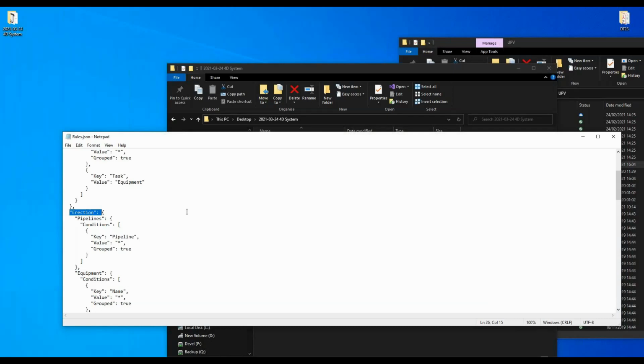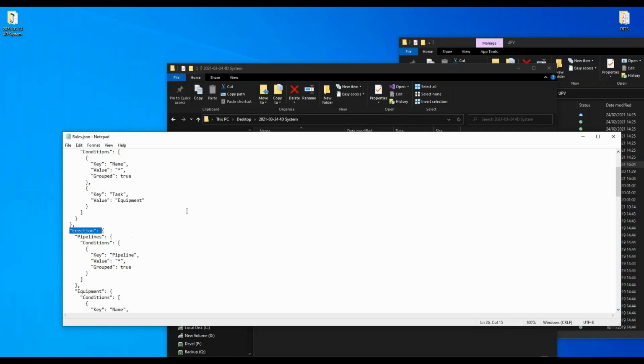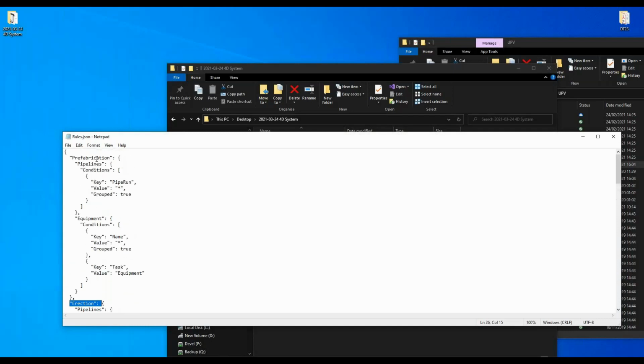Let's assume, for example, you have a certain valve and that needs to be removed from the pipeline, cleaned, and put back into place on the pipeline. Then you would have three different activities in here, and that's what these items do. You would always want to have the same item handled by a certain activity.